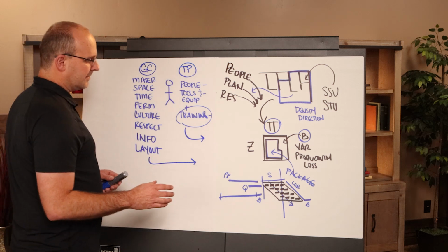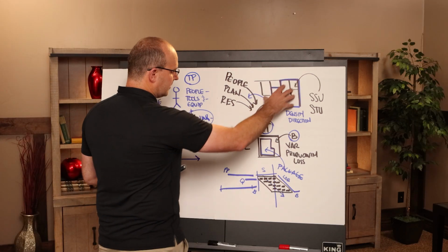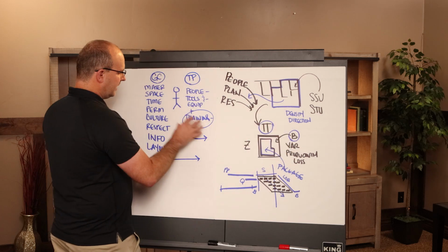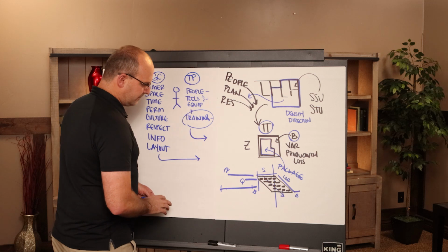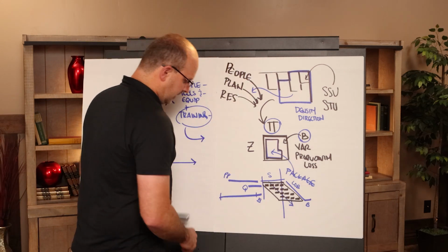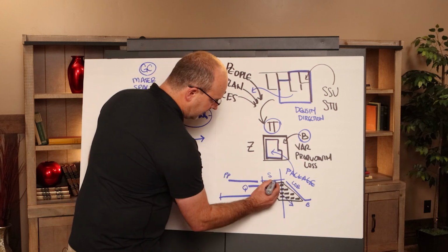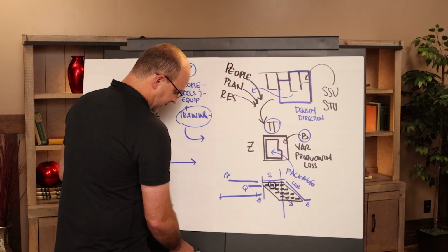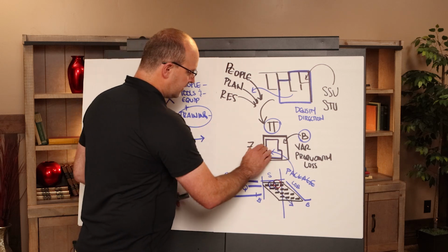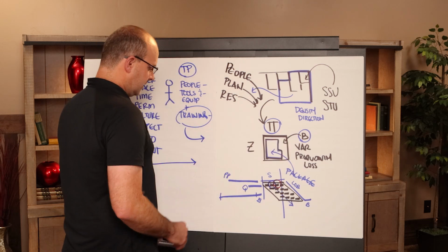But the key thing here is, yes, it's based on the right zoning. Yes, we've packaged it properly. Yes, we have a buffer. Yes, we have everything we need, but we have to be looking at how we integrate with other contractors. So let's say that this wagon right here is that wagon right there. The other key thing is there's a wagon behind that individual that will come into that same zone to do that same work.